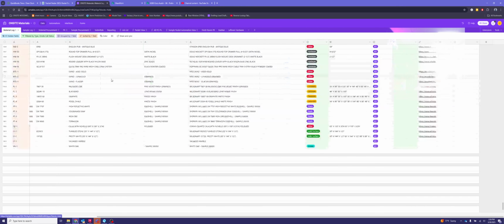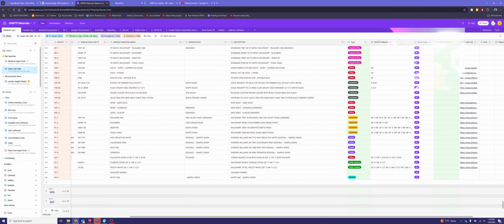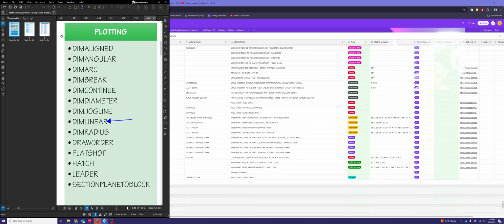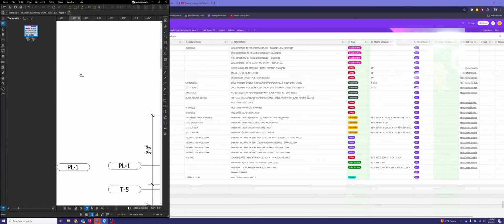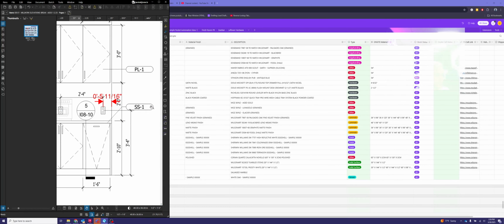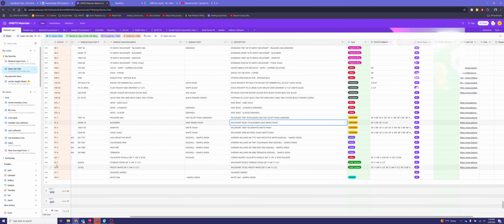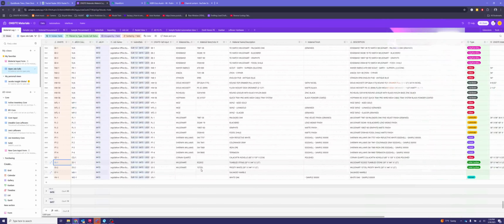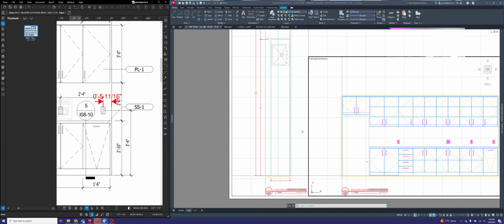Let's find our job real quick and see what we've got. And again, on our drawing from the architect, they were calling that countertop out to be SS1. Okay, SS1 on project legislative office building. SS1 is right here. It is available in a total length of 144 inches long. So we definitely need a field joint in that countertop.